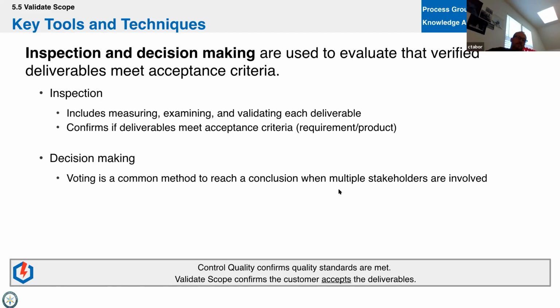Okay, but you know what? I like what you got here, but can we add more padding to the armrest? So now we haven't built the correct chair for the customer, and they can request that change. Only they can validate that something is correct for them, but we can verify that we've built it correctly.